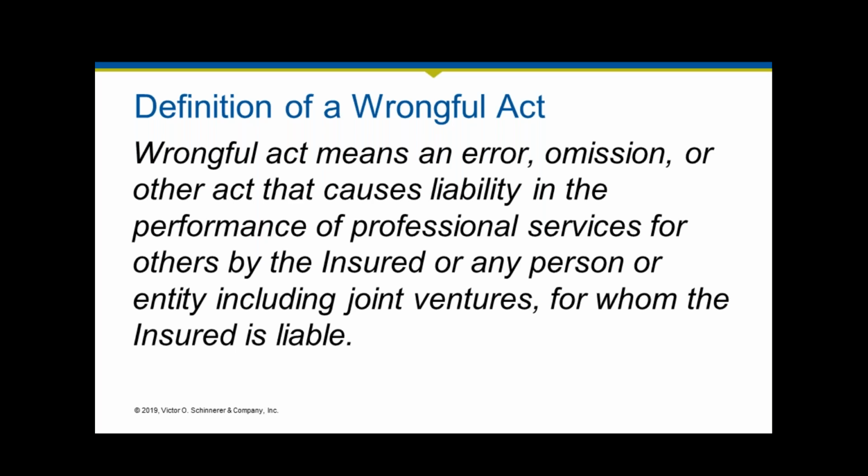I think this is interesting because it not only covers your firm, but it covers your firm for your participation in a joint venture. And in a joint venture, you should realize that you have a lot of risk. You have a lot of risk not only for what you do, but for what the other joint venturer might be doing. Because in the eyes of the law, in the eyes of your client, that joint venture is one entity, and there's joint and several liability there. So either party to the joint venture can be held responsible. And this makes sure that you have coverage if you're the one held responsible.